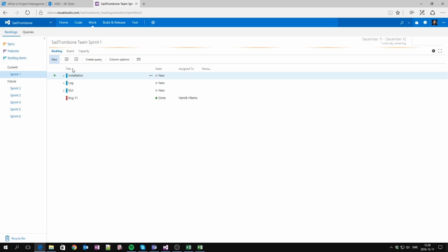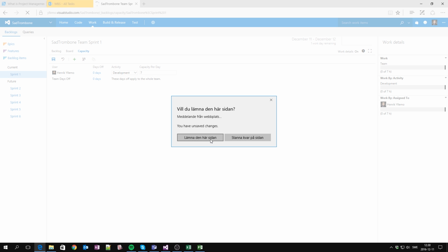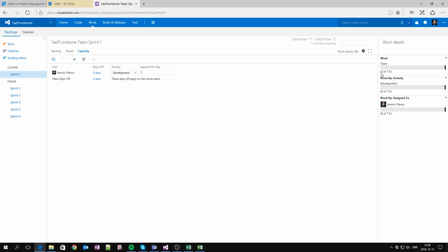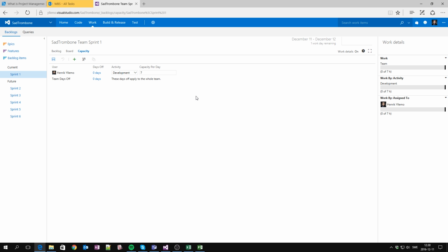And you can see here in the TFS, I can see the capacity flow. For example, I can see who is underworked and overworked. So for example, if I'm doing development and I have a capacity of 7 per day, whatever that is, 7 hours maybe, I can go in, we just stay here and we just save this, and now I have this capacity flow. I can have the same thing within Microsoft Project with the resource planning, so I can plan the resources and how much time they have, and I can allocate it, and then I can use either TFS as a backend or SharePoint as a backend. That's really nice of Microsoft Project, and it's going to be included into SharePoint from now on, I think, as an extension model. I think the licensing model will be separate, but still it's going to be pretty easy to integrate together with other things.